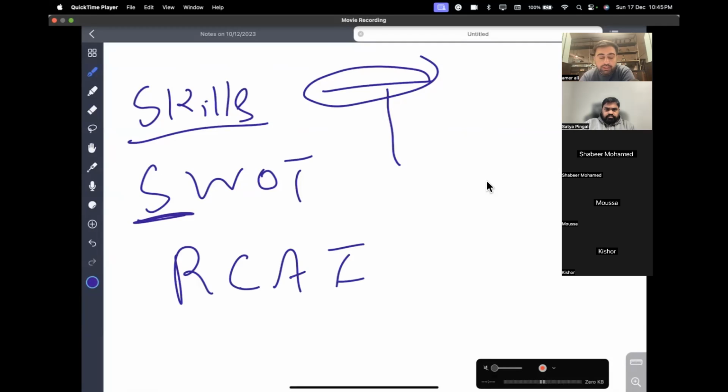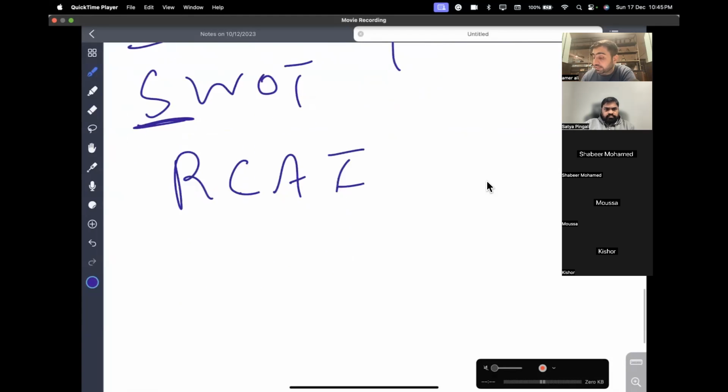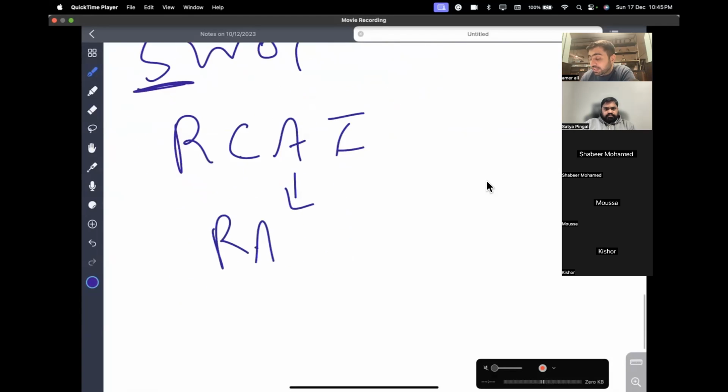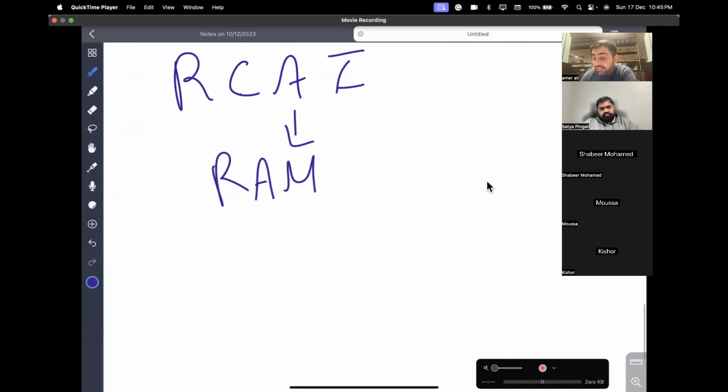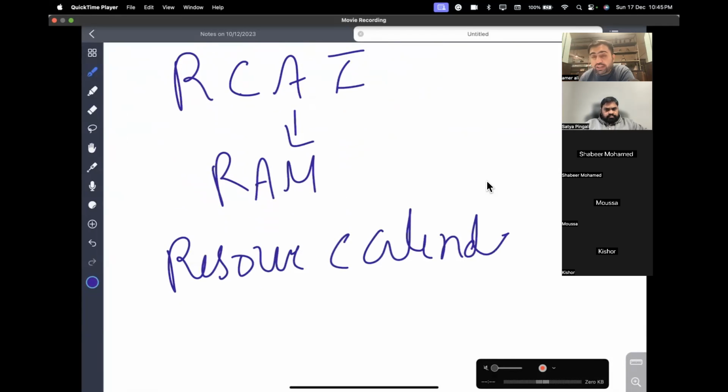It should be seen here: who is responsible for what, and how I'm going to use that. And I make a RAM, which is a subset of it, showing who is responsible for what part in that area. Then I will use a resource calendar to identify all the resources, when they will come and when they will not come. Okay, so we have the entire resource management plan.